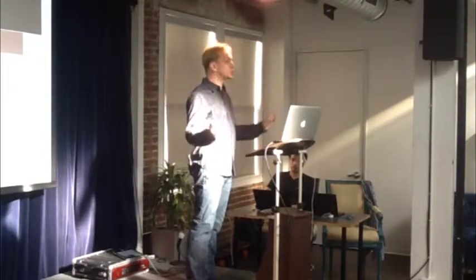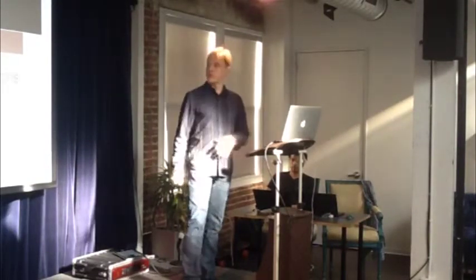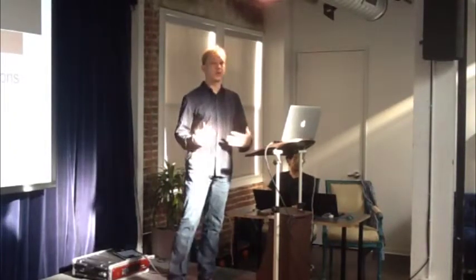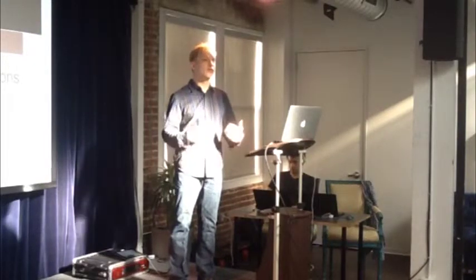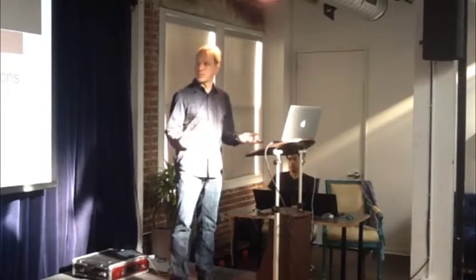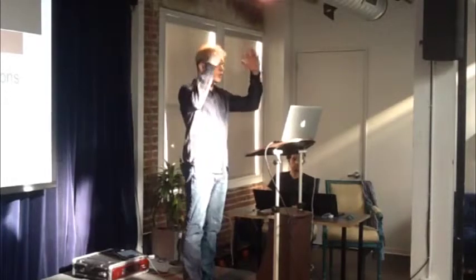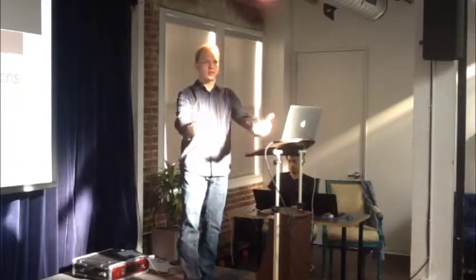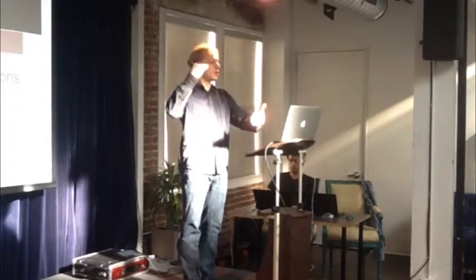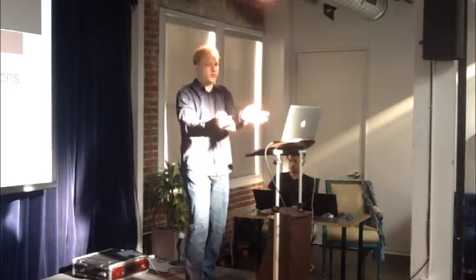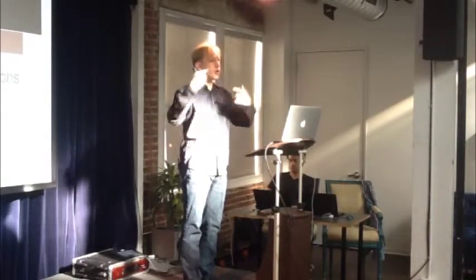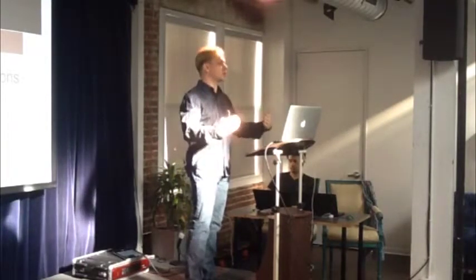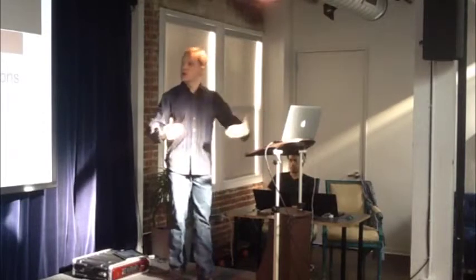I'm going to make a group called specifications problems. So the first one is unwritten assumed specifications. This is more a problem with first-time product owners and first-time startup owners. This is where you have some set of ideas of how you think the site is going to work, and you write down what you think those ideas are, and it turns out that there are things you assumed, like if we build X, well, obviously that means Y is included, but it was such an implicit assumption it never hit the paper. So this is a problem of communication between the product owner and the developer.